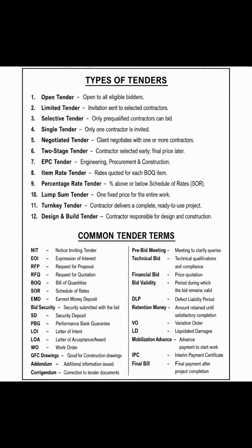Then we have financial bid, which is your price quotation. Your price quotation is still part of your financial bid, because you are going to have the technical and the financial, for those that understand bidding very well. The technical is where your documents and your profile are going to be attached. Then the financial is where your BOQ is going to be attached.